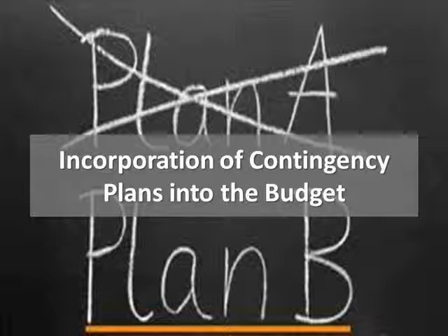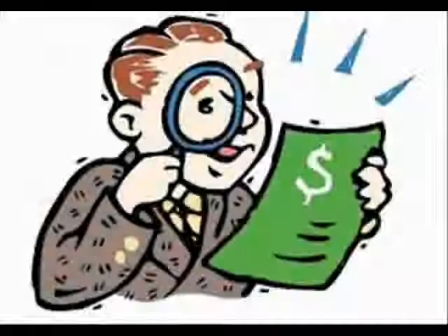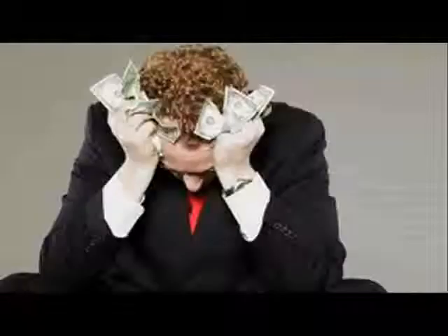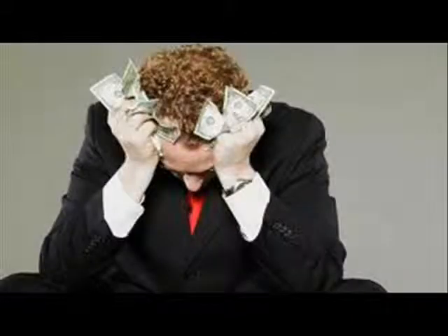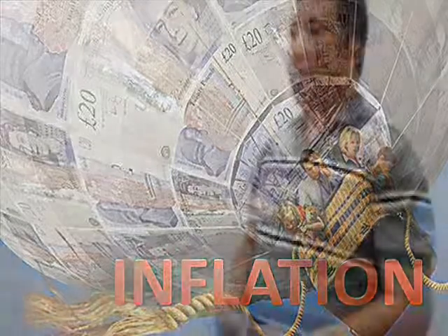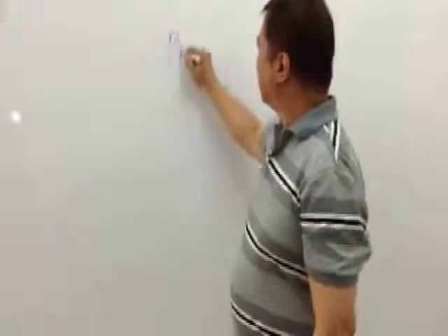So if contingencies are considered at every level, budgets can be overstated, and therefore project managers will have to be very vigilant in reviewing the details of the budget. Now, before we end the discussion on budget, project management will also have to deal with financial issues, more particularly inflation.